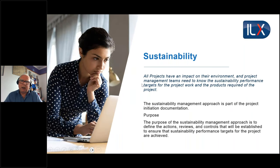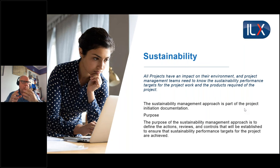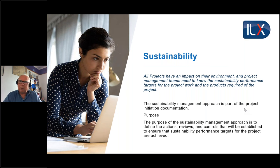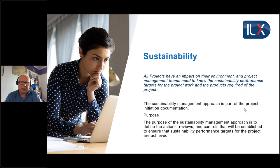All projects have an impact on their environment. Project teams need to know about the sustainability targets for the project work and products required. This covers waste, opportunities, where we procure raw materials from - all of these elements become part of sustainability. There will be a sustainability management approach as part of the Project Initiation Documentation, defining the actions, reviews and controls established to ensure we achieve those sustainability performance targets.